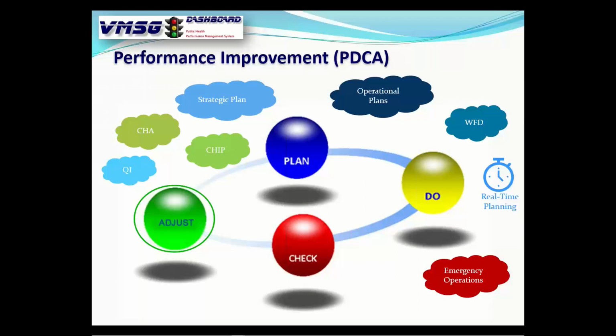So that's the PDCA cycle. You determine what the cycle time is here, but you're always going to have the ability to go in and make no adjustments, adjust the plan, adjust the resources, or potentially adjust both.